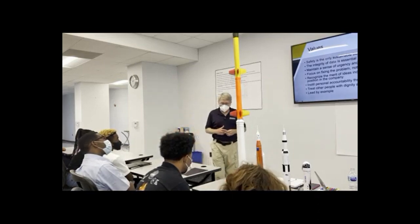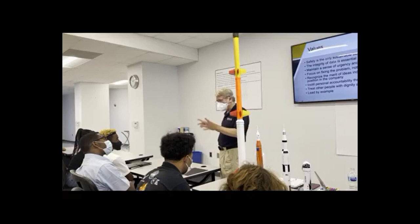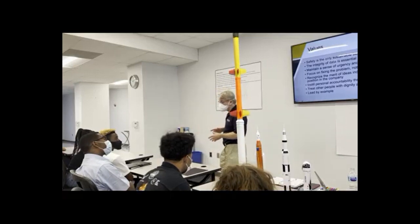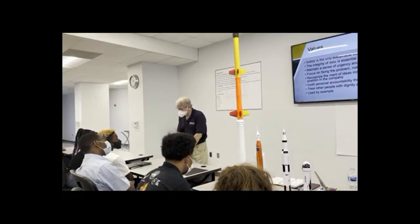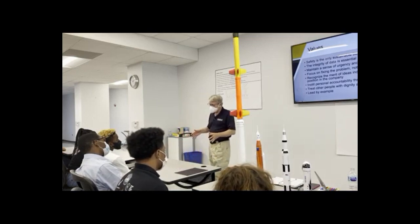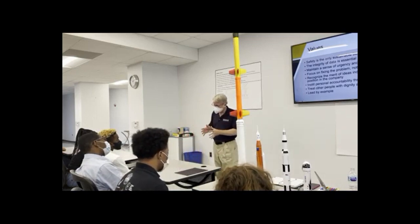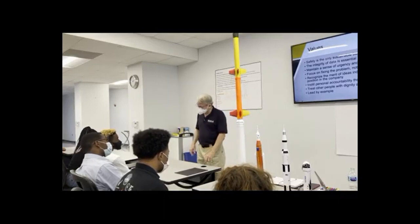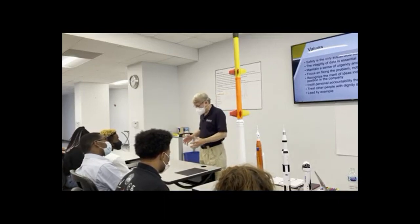We started doing that, and it sounded like a really good idea, and it was a really terrible idea because we were too small to do that. And by splitting our attention, we failed at both of the projects. If I had that to do over, I would have stayed concentrated on the first one, even though ultimately we were right, the market wasn't that big.